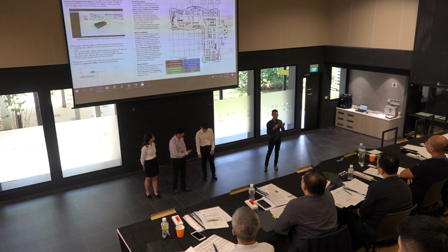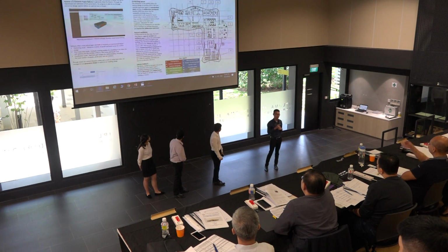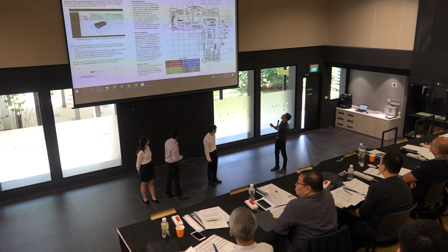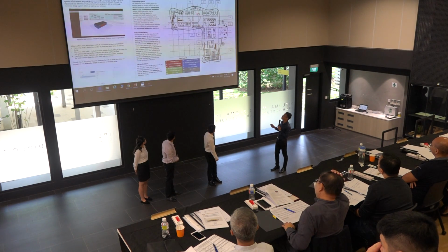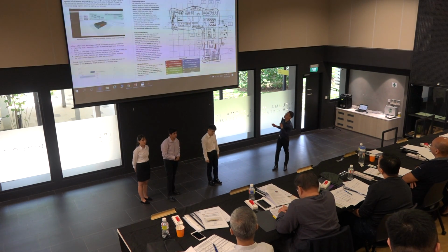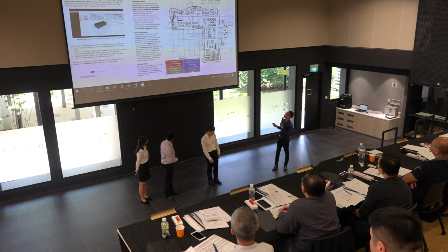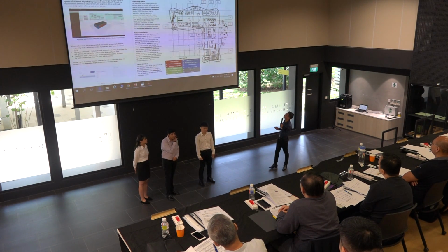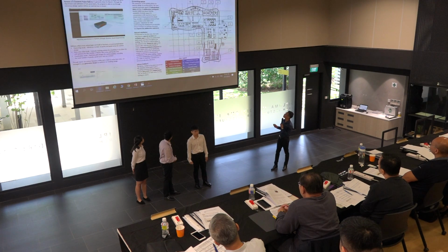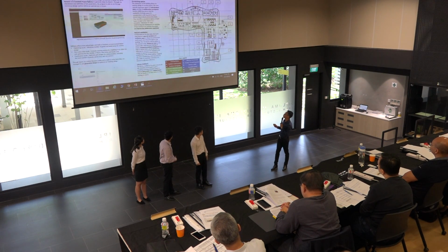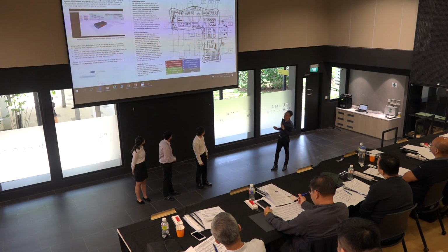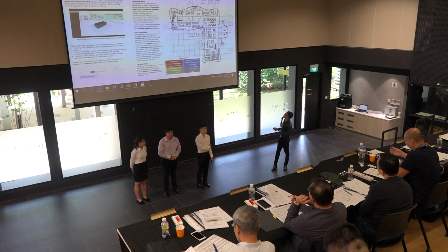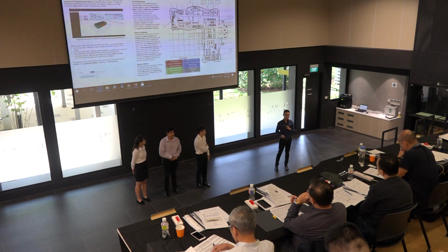Okay, so while we don't have a PPVC plan per se, what we do have is a typical floor plan. So what we have here is the toilets. These toilets are going to be repeated throughout the 4 floors. We have split them into male toilet, female toilet, and in between, handicap toilet. We will split this toilet module into 2 for ease of transportation. Then we have our lift shaft and stairs, and that's the first set here. Then we have the same thing over here, so basically we can double the use of PPVC. Yeah, that's our PPVC for this project.